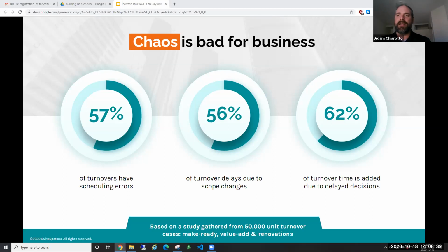If you look at a door and the door looks fine, but, let's say we're going to replace the flooring, and we know that there are 2 layers of vinyl underneath the ceramic or underneath the wood, and we're going to bring it all down to base. Well, we need to measure that in advance so that we order the right door. We make sure that we have the right finishes. We know everything that's going to happen so it doesn't surprise us down the road.